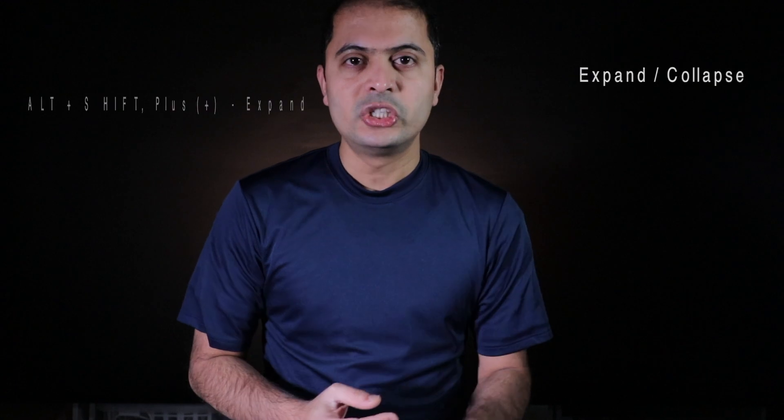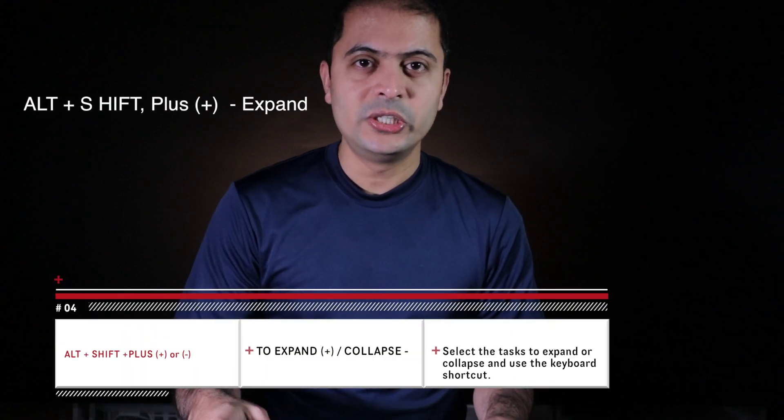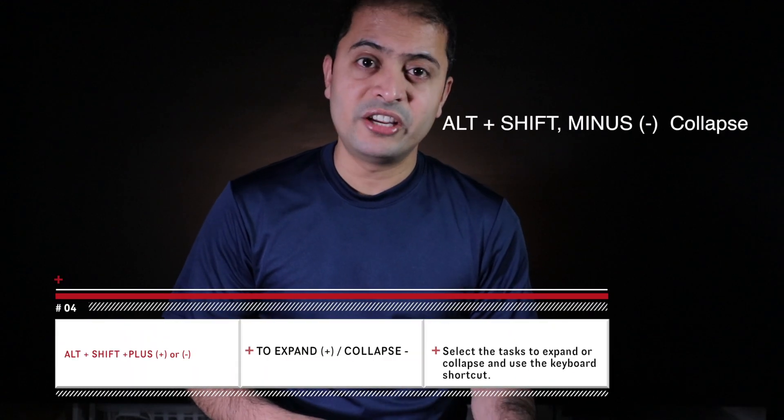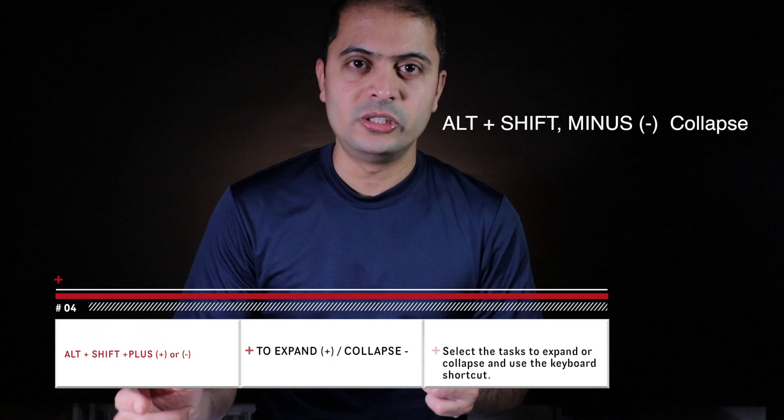This is a quick easy way to collapse and expand summary tasks. Use Alt+Shift+Plus to expand and Alt+Shift+Minus to collapse.